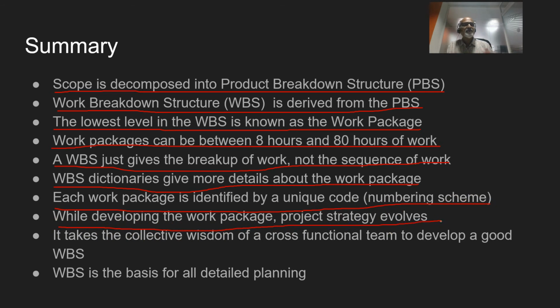While developing the work package, a project strategy evolves. So that means when we do a WBS, sometimes we'll have to decide what all things we'll do ourselves, what all things will be subcontracted, what all things can be prefabricated.